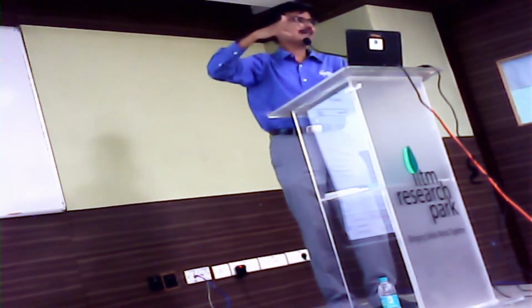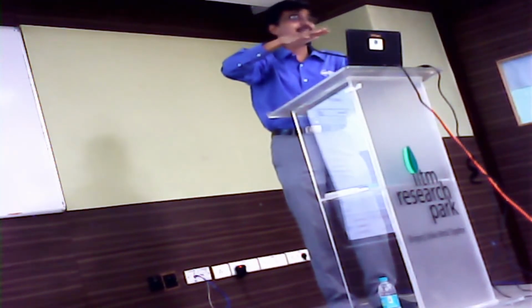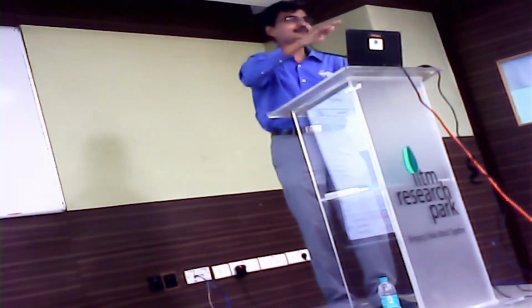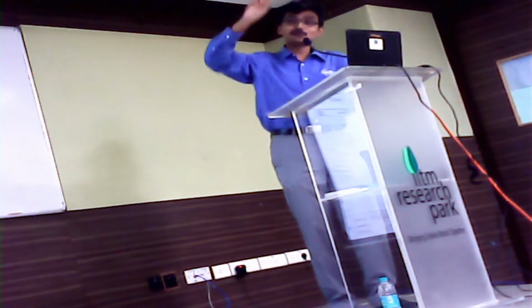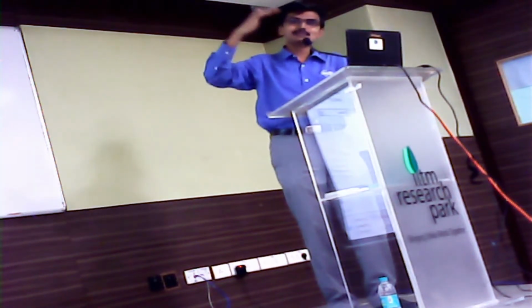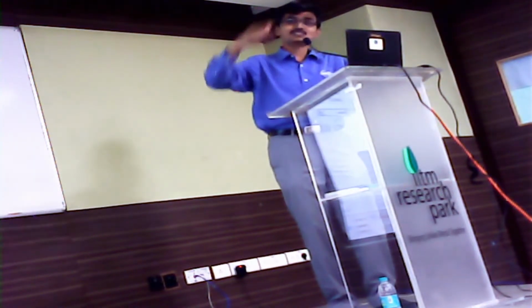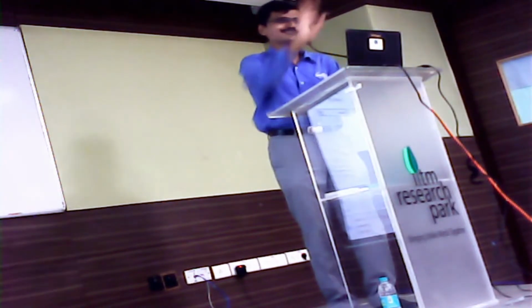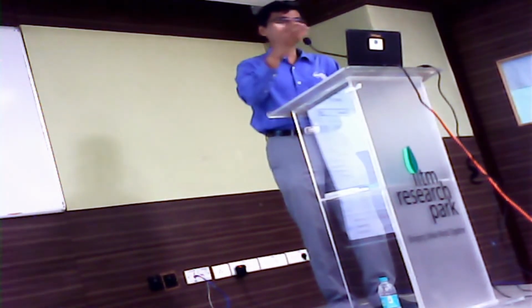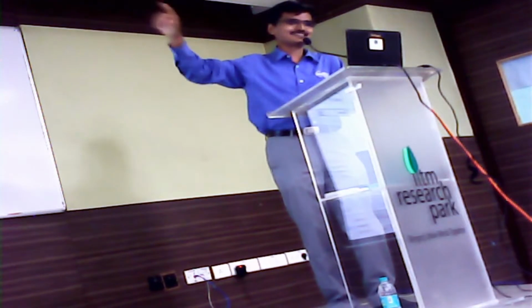Now, the last calendar, what did I mention? Task calendar. You might say there are certain tasks that need to be done on specific timing. Do you all agree with this? Maybe it's a routine or a production support or anything, where you don't really worry about whether the team is available or not because they can work in shifts. So for those types of tasks, we go for a task calendar. So task calendar will never respect your resource, and there's a higher chance there will be resource overallocation.